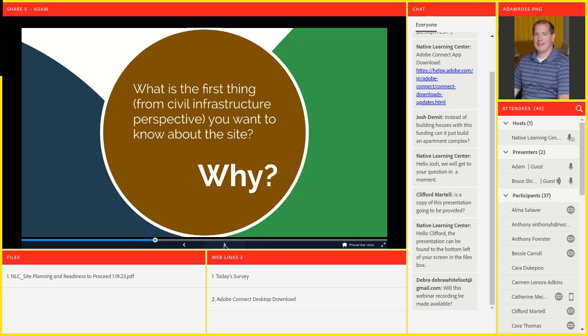So we prepared the CEQA and NEPA documentation for that, contracted all the special studies, and the tribe had already had some studies done, geotechnical, etc. So we compiled all that information and then also started our community outreach with the residents of Cloverdale, the school district, other property owners to see who would want to join in on the annexation.